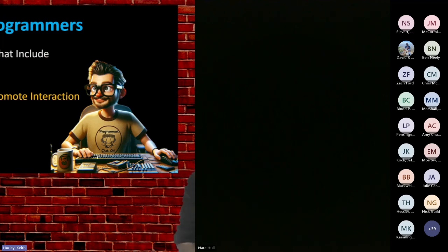They're going to work for 2 weeks on a part of that. Bring it back, bring in the project manager, and I bring in that advisory committee I put together, and we sit down and they show us what they've got, and we can offer advice on that. They're going to ask for any decisions that need to get made, and then they're going to do the next little chunk and the next little chunk, but it keeps us involved throughout the entire process.